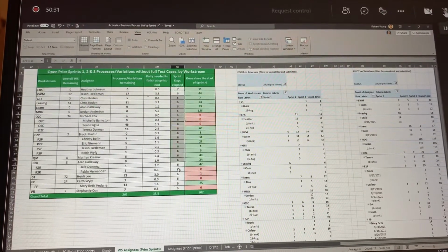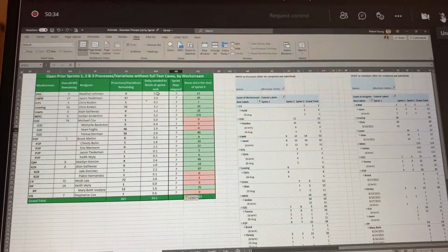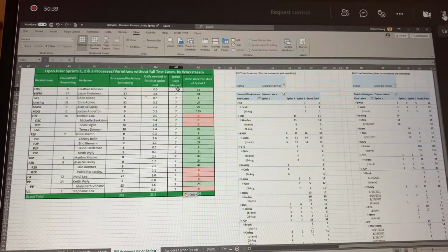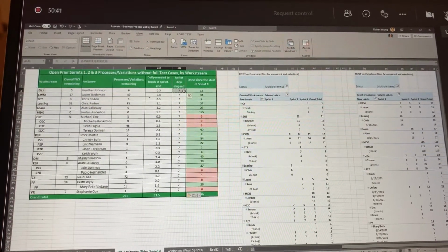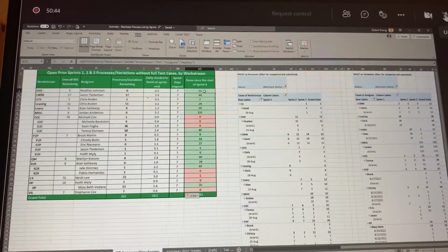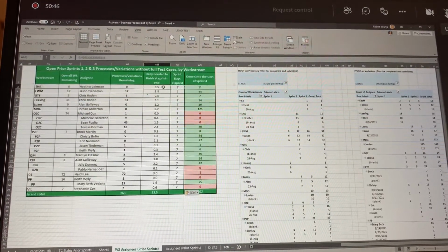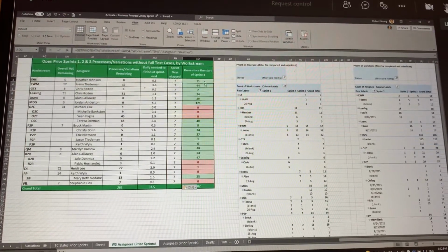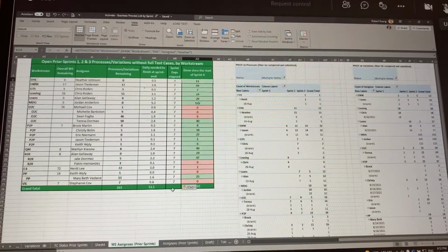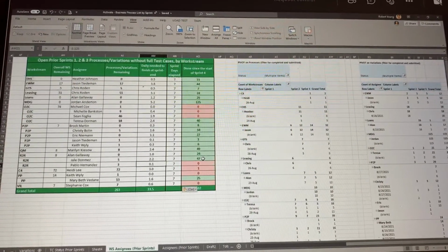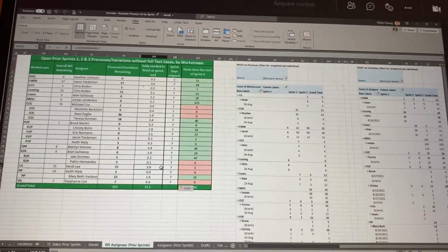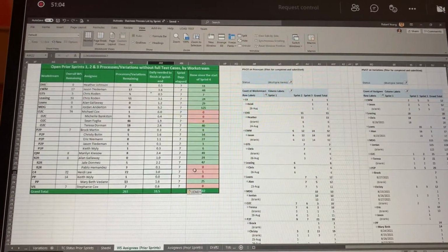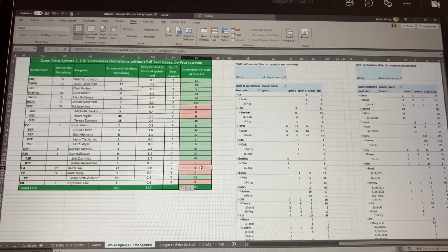Then there's a conditional formula that multiplies this daily needed by this number, and then it compares that result against this number here and assigns it a color. So 5.5 times 7 is 3.5. 3.5 is less than 11. Therefore, this should show green. Down here, let's go with this one. This one, 3.0 times 7 is 21. 21 is greater than 1, therefore this shows red. Okay?